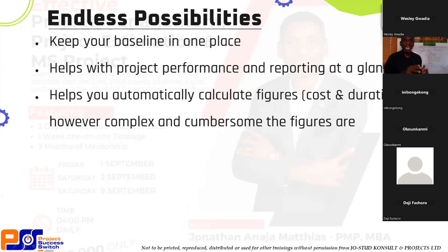So that sometimes a project that has 2 days duration and has 300 activities may not necessarily equal to 600-day duration. It can be less if most of the activities can be done in parallel instead of one finishing completely before another one starting.